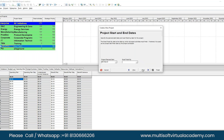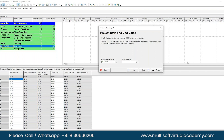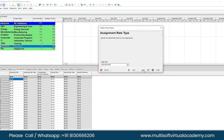By default, project planned dates are today. You can change them by clicking the three dots and adjusting. If you have a deadline, enter it in the Must Finish By field. Right now we don't have one, so skip that and click Next. Responsible Manager is already set. Click Next. The rates are for unit rates for resources — we'll cover that later, so ignore it for now. Click Next.